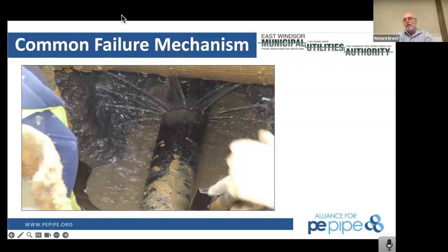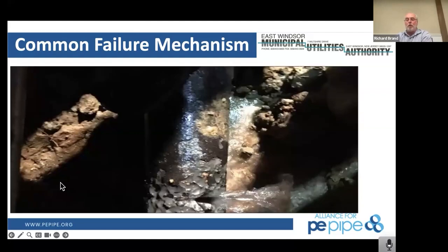There's always a new contractor that comes in, and we are prepared. We warn them well in advance during plan review. Also, when they turn in their submittals and shop drawings, we review them and explain what we want. On their final approved plans, we make sure there's notation that requires all stainless steel bolts.